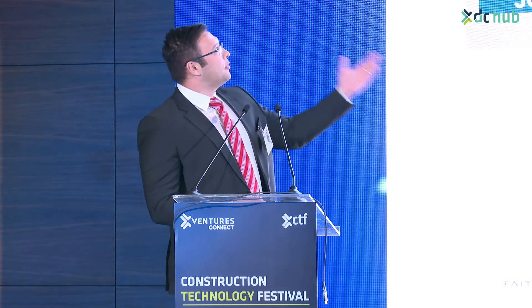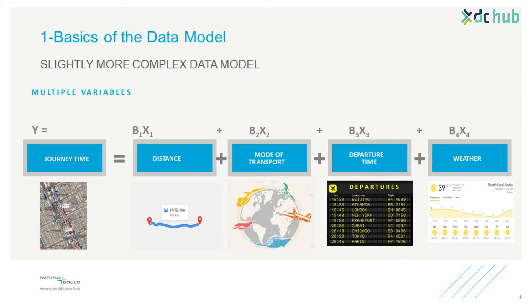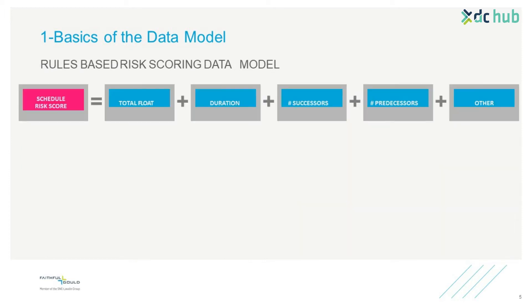In normal circumstances, if you are looking at a basic simple data model, journey time is very related to distance. If you want to make things a bit more complex, we look at journey time, distance, mode of transport, departure time, and weather. Applying this to our schedules, it may relate to total float, duration, number of producers, and other things.